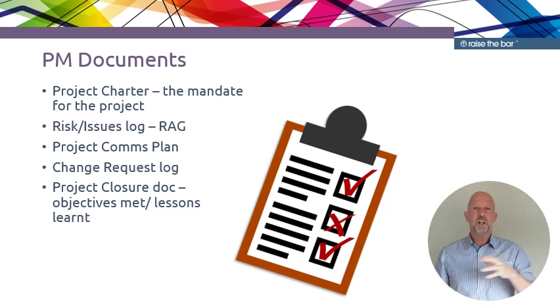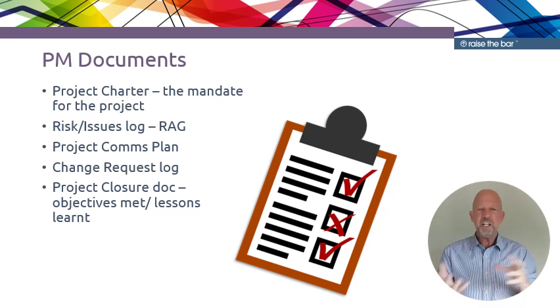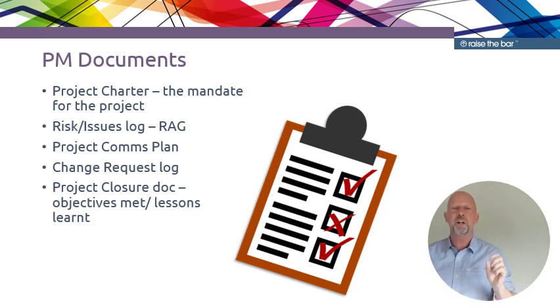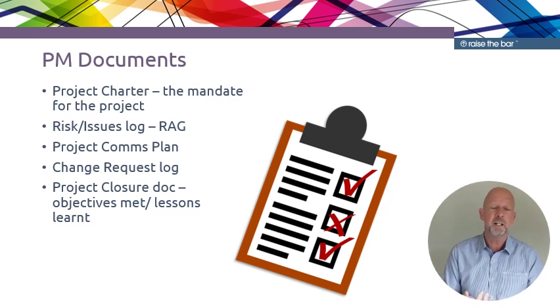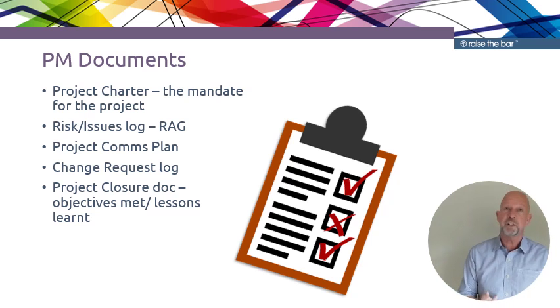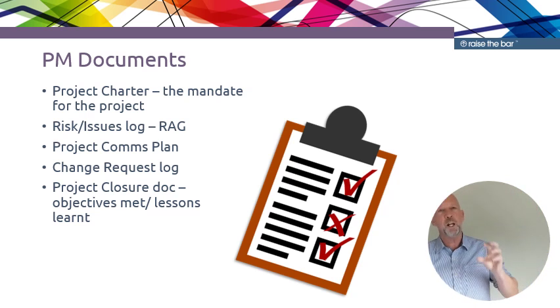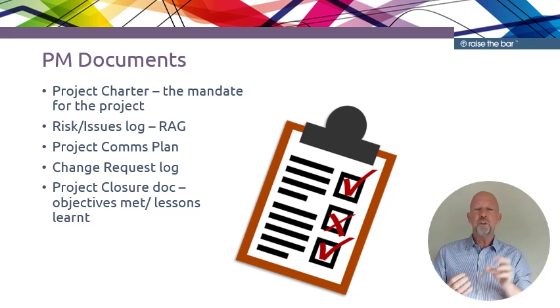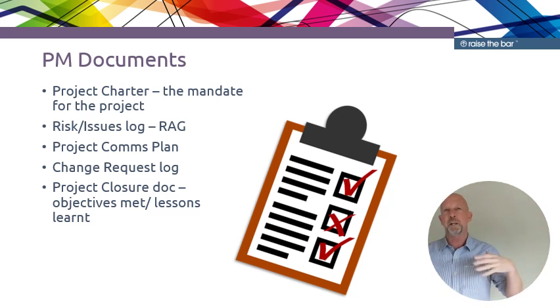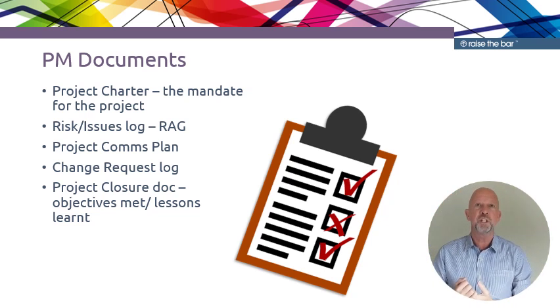Now, project managers constantly have to weigh up any changes that come across and the impact they could have on the project. Could it increase the budget? Could it push out the timescale? Does it mean we need extra resources involved? So a change request log should be kept by the project manager throughout the course of the project and is continually updated and checked. Often they will go back to the project sponsor and make sure that the project sponsor is happy with those changes, or do we need to control them and manage them more effectively.